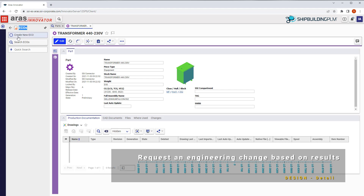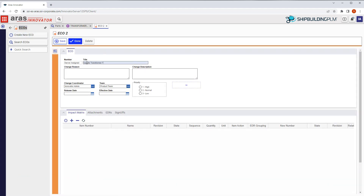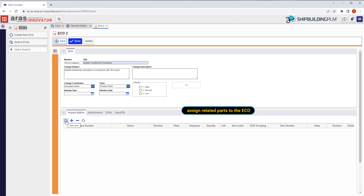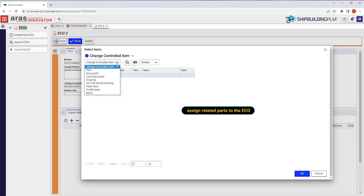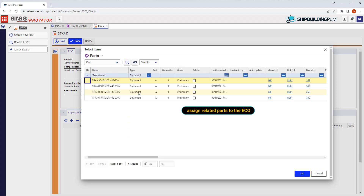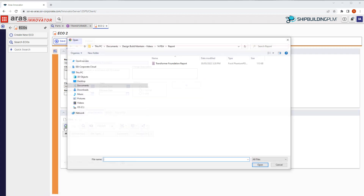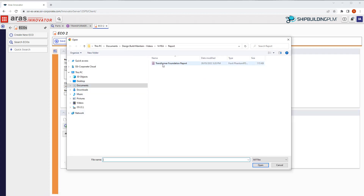As a baseline of this area has already been released, an engineering change order, or ECO, is required to execute the change. To complete the ECO, the affected parts are linked. In this case, we will ensure the transformer and the report containing the recommended changes are attached.